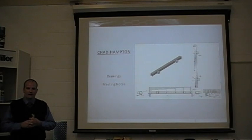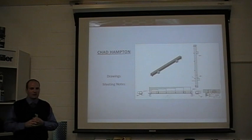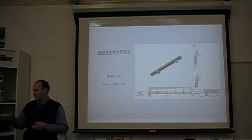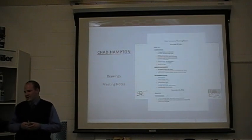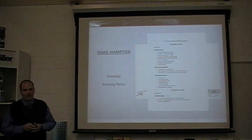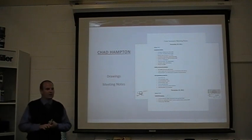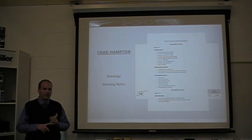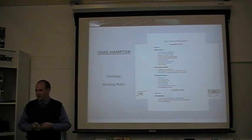Luckily, we had a great leader to keep things going and make sure progress was happening, but it's important to note down how things flowed. The basic outline was what assignments have we finished, what assignments do we still need to do, what are the new assignments for this week that we need to finish by next week.